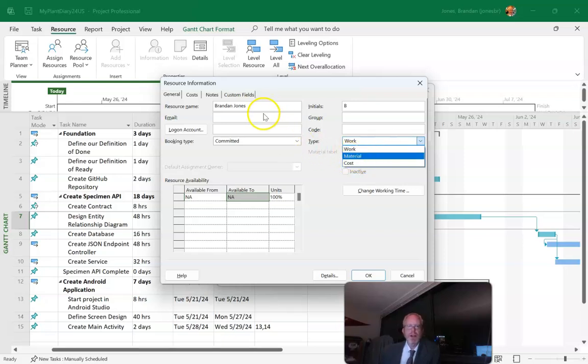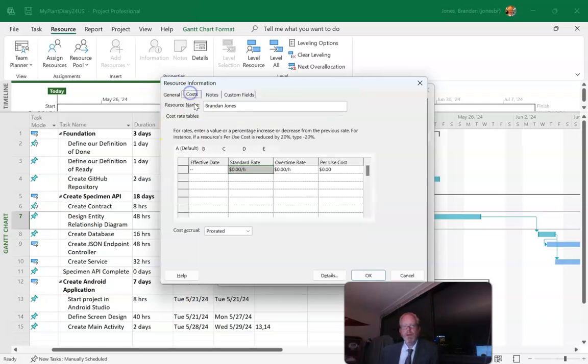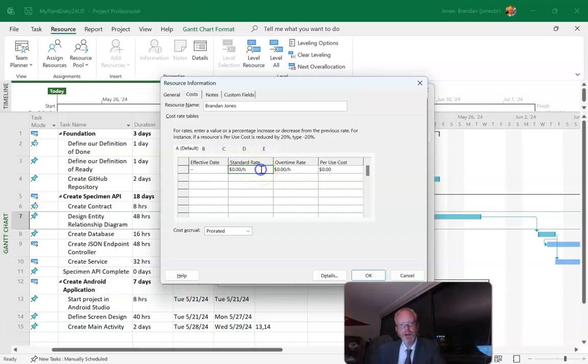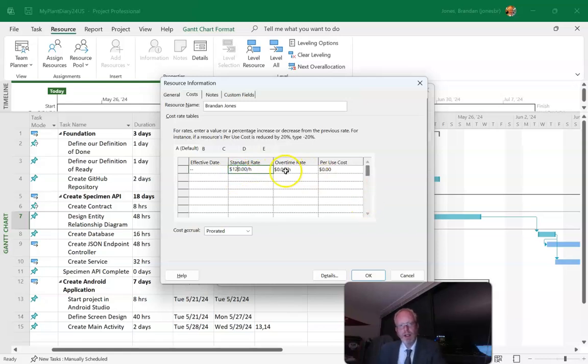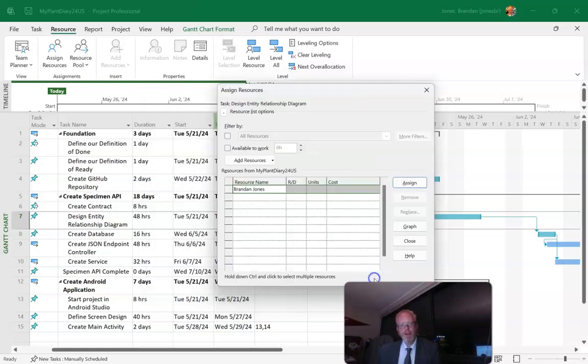So we have resource name. I can put an email address. I could log on with a Microsoft account for instance. And now down here we have my availability but over here we have cost. So we'll say okay, what's my rate? Let's say $120 an hour for normal work and then overtime rate say is $160 an hour. And okay, that's me.